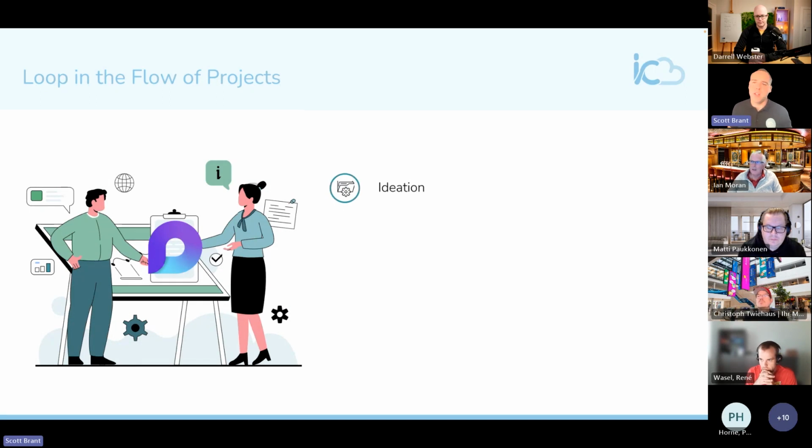So very much at the start of a project, if you're anything like me, you might be speaking to a customer, one of your colleagues who brings you in and says, we're looking at this new initiative for our company, and we need you to bring together a team and some ideas for it. At that point, it's not a project, right? You haven't been given the go-ahead to go and get a PO number, start booking time, start having invoices generated. But the idea starts there, and you need somewhere to log that idea.